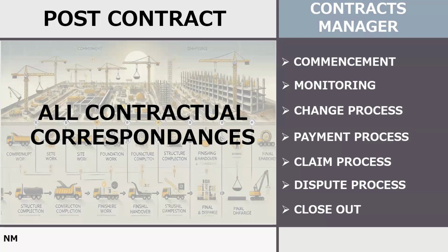Another example regarding the claim process: if you have a FIDIC form contract, notice of claim is a condition precedent. That means it is time barred. If you miss it, or if your notice lapses the given time period, which is 28 days most of the time, you will lose the entitlement to claim whatever damage was caused by the employer breaching his obligations.